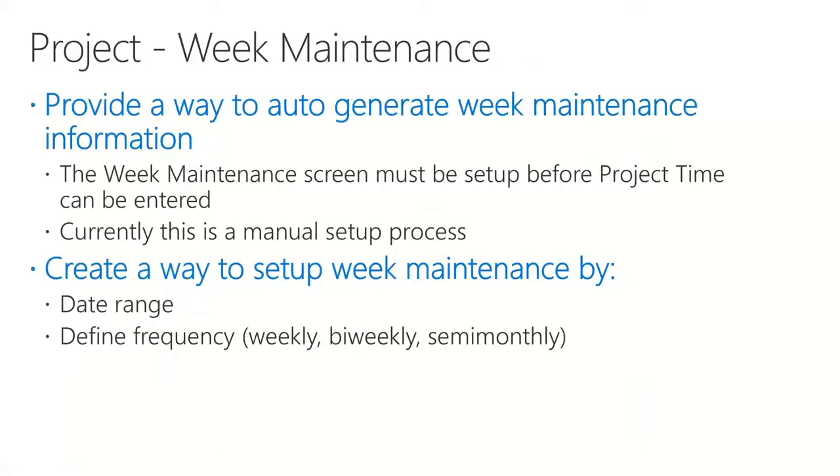Now jumping into my project people, this next feature is for those people who have to set up the project week maintenance screen. Now you might say, Jeff, what is this screen? Well, inside of SL, if you're going to do time against the project, you need to set up what your weeks are. Are they 1 week? Are they 2 weeks, bi-weekly, semi-monthly? Insert all the different ways you can set up a week for doing your time entry.